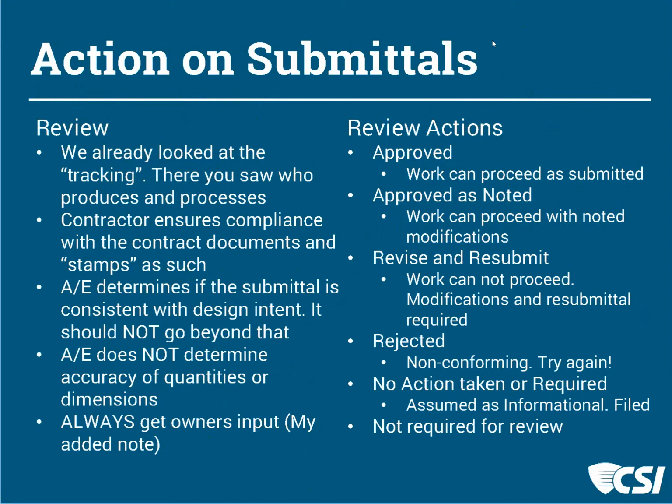Our action would be that as the architect or engineer, we would decide, is it consistent with our design intent? But that's as far as we go. Is this consistent with our design intent? And that is what our review is about. We are not determining accuracy of quantities. We're not determining dimensions. That is a part of the process that the contractor is responsible for.